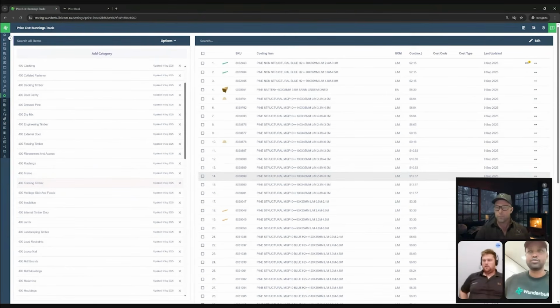Yeah, and I think that's a good point, that it purely just becomes maintenance. There's no builder's knowledge needed other than doing the linking once. So there's the knowledge to go through and understand what item equals what. But after you've done that once, the other idea to understand is that you don't have to link every single item from every single price list. The idea behind the master list is you only link the ones that are relevant to you as a builder. So it's building out your pricing DNA as a builder, of what you want to include and what your most used items are.